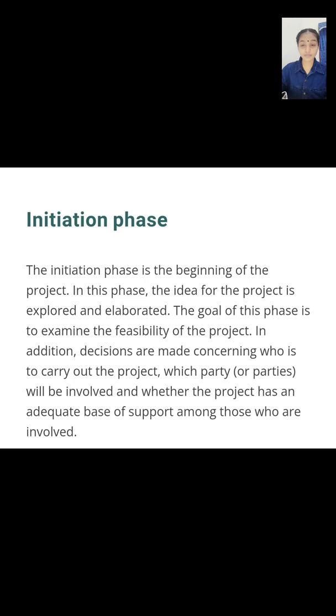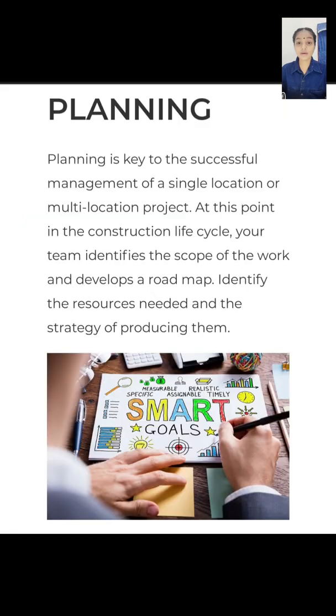From a broad perspective, define the project and write down possible solutions to specific needs. Do not make the decision alone. Consult your team. Ensure that a final recommended solution is identified. Once you give the project a green light, create a project initiation document, which is PID. A project initiation document is like a blueprint. It highlights the main purpose of the construction project.